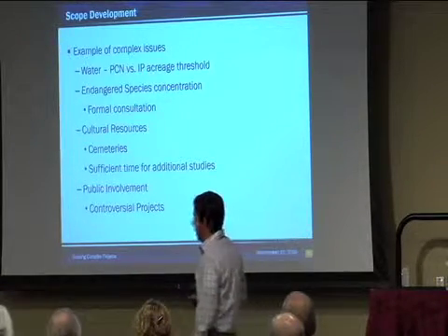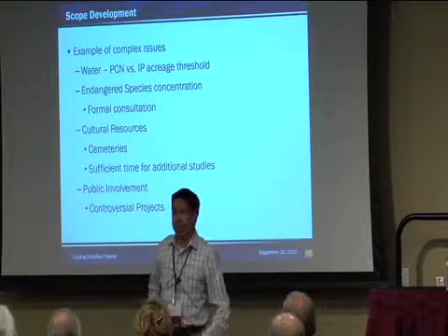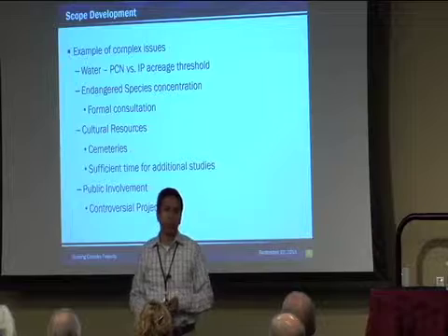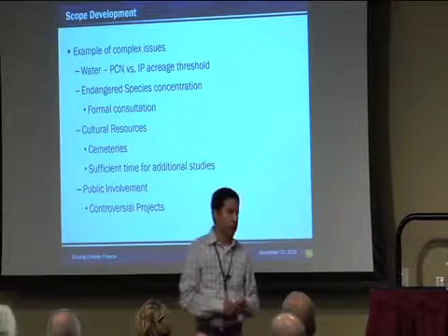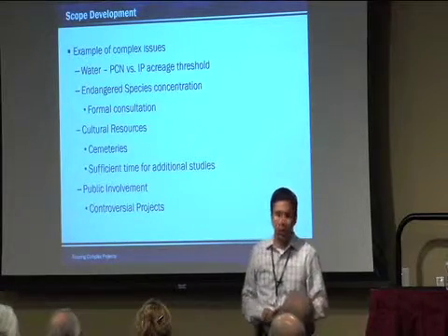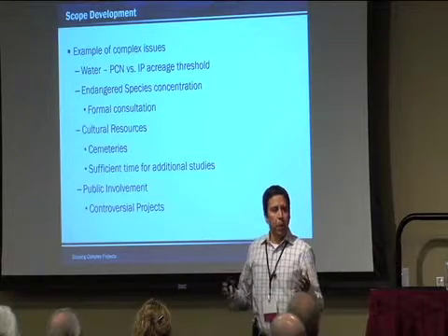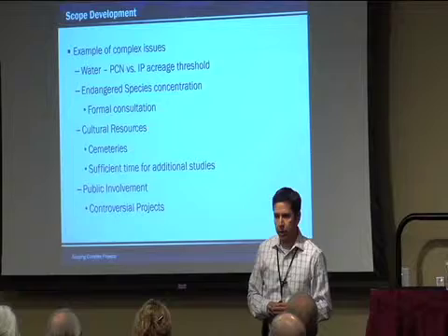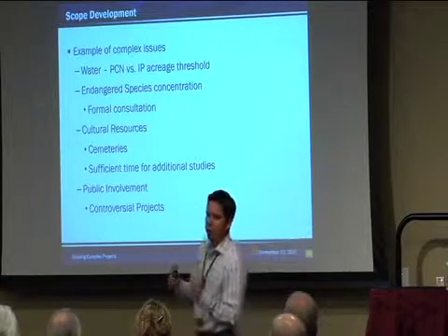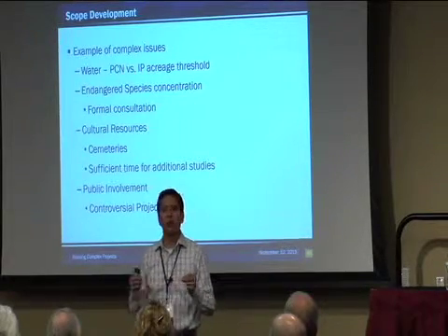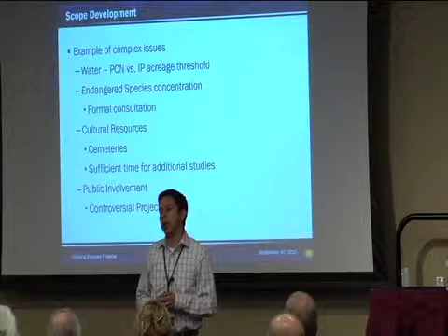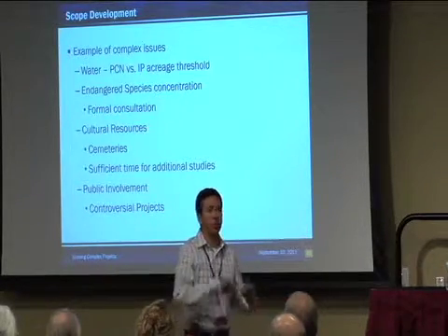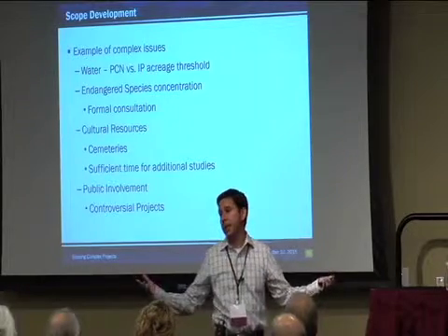Cultural resources, that's one of the things where you initially plan for the worst case scenario. With early constraints, especially for historics, there's enough material out there that you're able to identify if you're looking at a high probability area for significant cultural resources. Archaeology, you don't know. It's under the ground. There's probability mapping, but that's what it is.